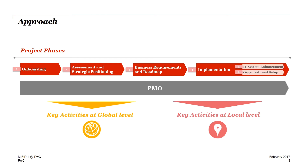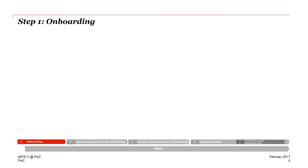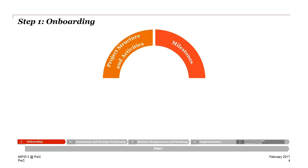Let's go into details of step one: onboarding. In the onboarding phase you need to decide on how to structure the overall project. This means finalizing a project structure — especially all high-level project activities need to be identified. Afterwards, there needs to be a definition of all project milestones, keeping in mind which milestones and what timetable the project will need to reach in order to be compliant with the entire regulation by the 3rd of January 2018.